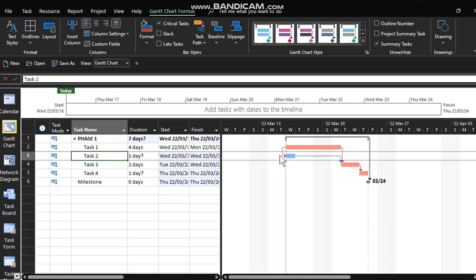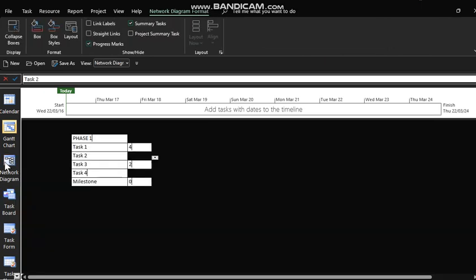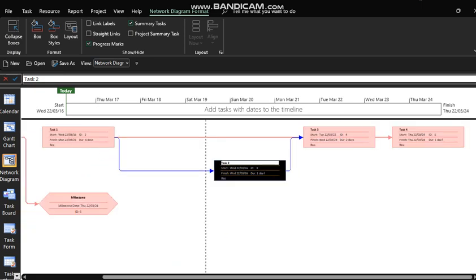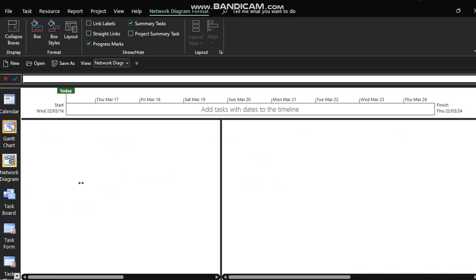Okay, so what we've got here is start to start, we've got finish to start. Okay, and then we've got a finish to start as well. So it's a double relationship. Now, in a network diagram, what happens is you get your split over here. That's what it looks like. It's a bit confusing in MS Project's network diagram configuration, but you can see there's a split. It's a branch, what we call a branch. You see that split there, and it goes to there. That's what's happening. You need to get that concept.